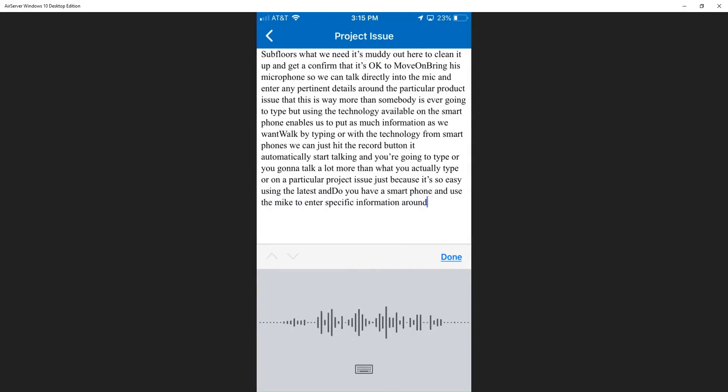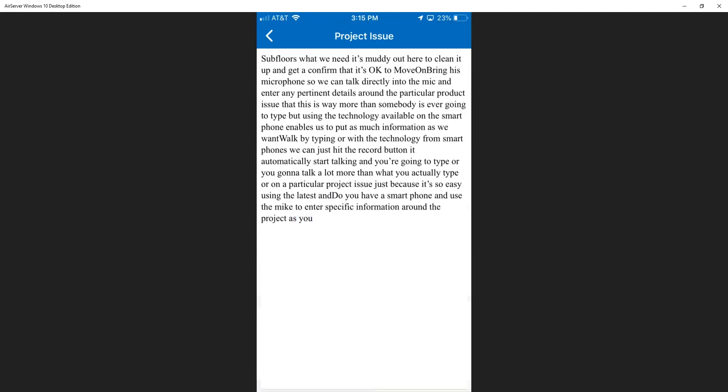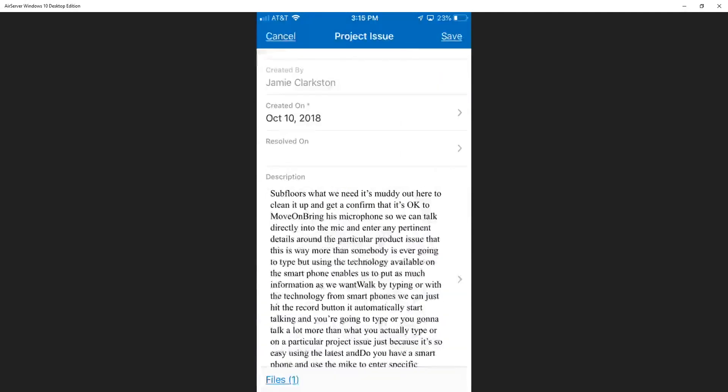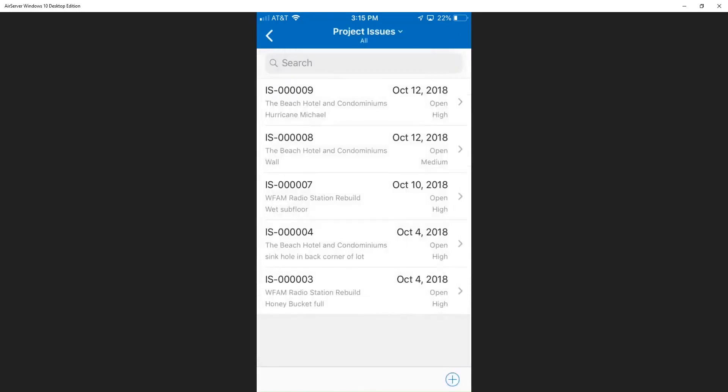Once finished, Jamie can click done and that project issue is ready to be saved. Once it's saved, he knows that it's automatically going to route to the project manager for review because they have the system set and configured to automatically assign project issues to the appropriate project manager for each project.